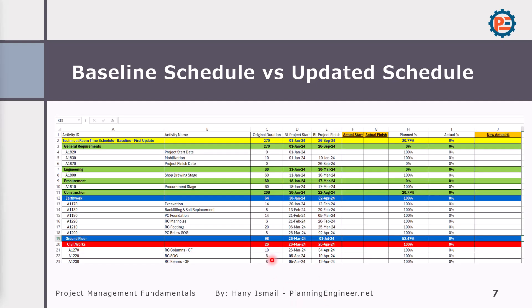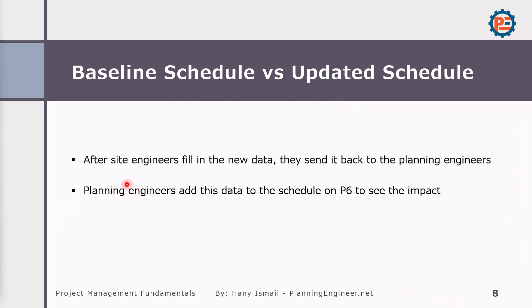Here is a sample of the Excel sheet. We have the activity ID, activity name, duration, planned start, planned finish, and then site engineers can fill in the actual start, actual finish, and the actual percentage. The planning engineer takes this information and updates the time schedule. After site engineers fill in the new data, they send it back to the planning engineer, who then updates the schedule.